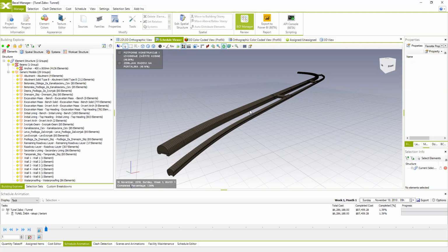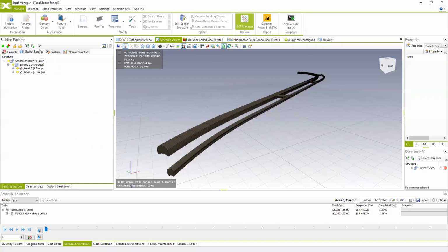And I wanted just to mention in today's webinar how you can do that and how you can manage these kinds of zones which are not related to your, let's say, buildings, or these automatically provided segregation based on buildings or the levels. So instead of that, you can use selection sets or any different kind of grouping of your elements based on the properties.